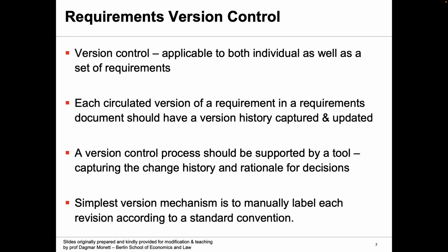Okay, so basically you're keeping the same document title, but just giving it this attribute that this is the approved version. And now if that approved version goes under some minor change, it then becomes version 1.1 draft 1, and so on. Your book also talks about minor revisions or major revisions.